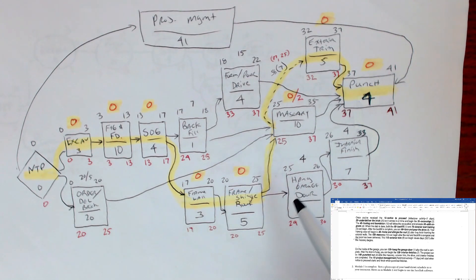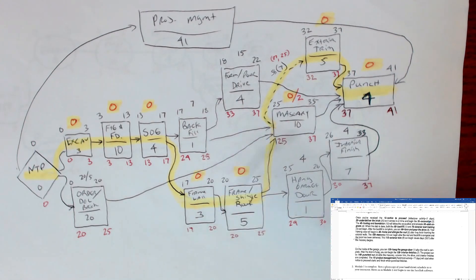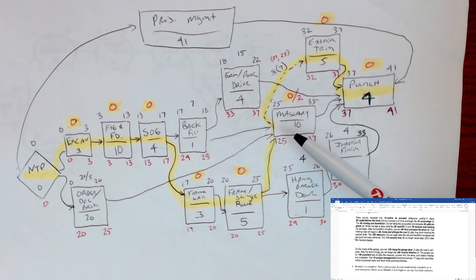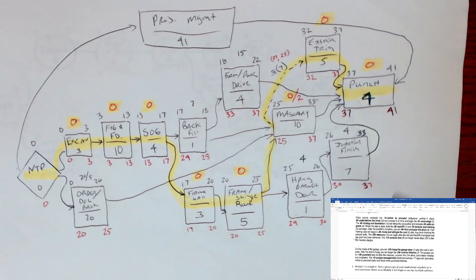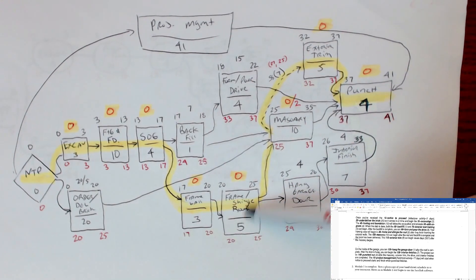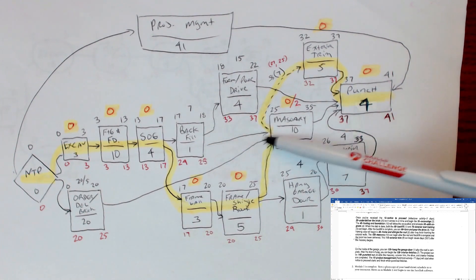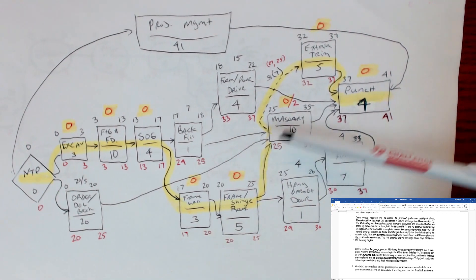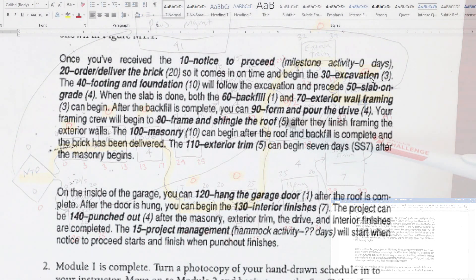After backfill is complete, you can form and pour the driveway. Now here's where it gets a little confusing. Order and deliver goes to masonry because your framing crew will begin to frame and shingle the roof after they finish framing the exterior walls. Masonry can begin after the roof and backfill is complete. We've already established order and deliver goes to masonry.